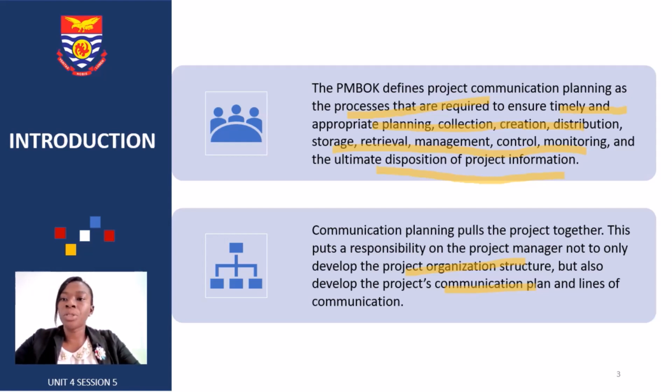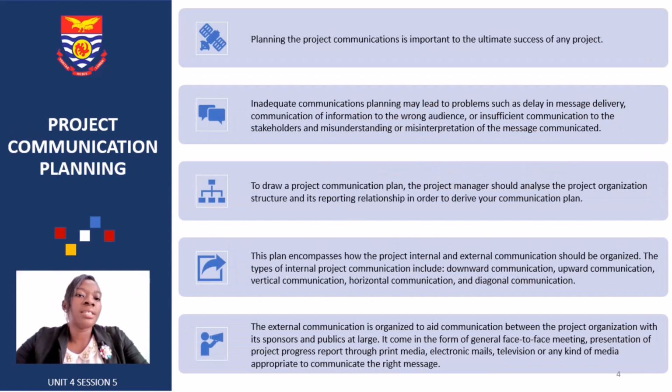So what is the project communication plan? This is basically planning. This is very important because the ultimate success of the project depends on our planning with the communication. Inadequate communication planning will lead to problems such as delays, especially when it comes to message delivery, communication of information to the wrong audience, or insufficient communication to stakeholders, and obviously misunderstandings and misinterpretation of the message communicated.